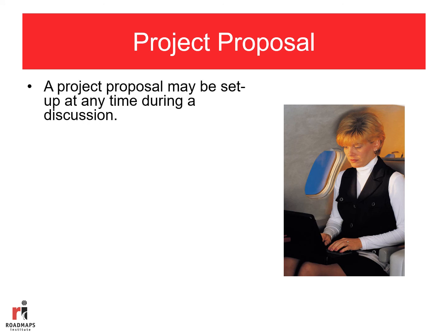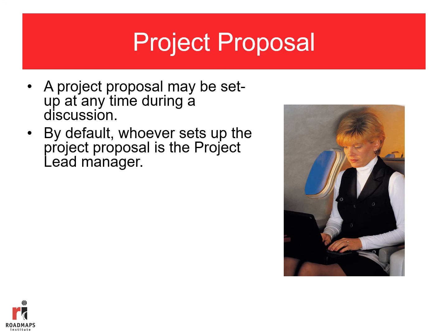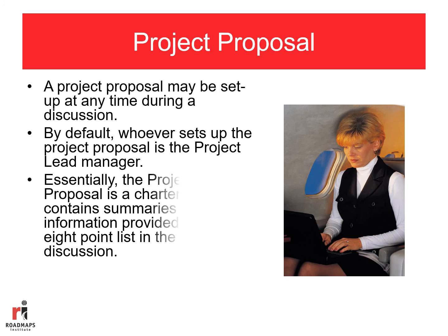So one of the things we do want to achieve out of this discussion is development of project proposals. Now, for each discussion, we could have multiple project proposals, and a project proposal can be set up at any time during a discussion. By default, whoever develops the project proposal becomes the project lead manager until leadership is discussed, and a new manager or the same person would, by consensus discussion, become the de facto leader.